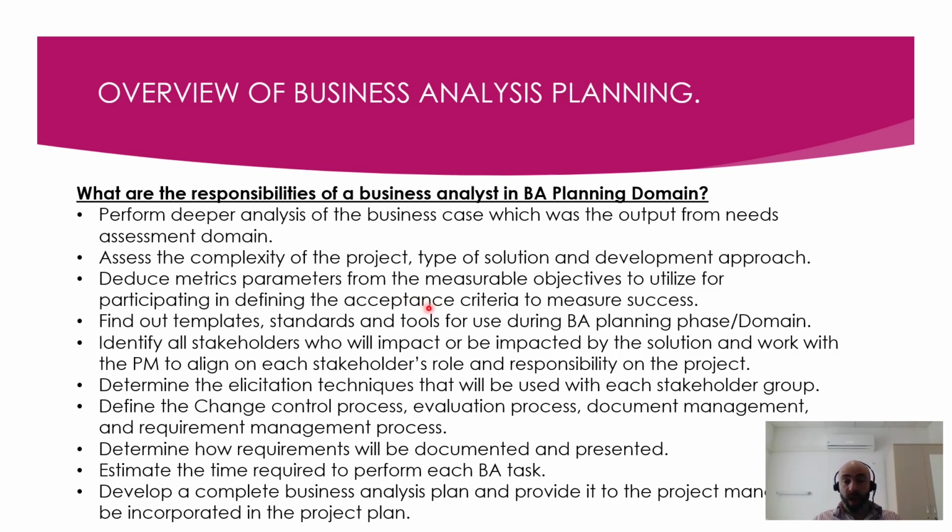So how can I determine whether my solution or my project is successful? I can only determine that if I meet the acceptance criteria, which is a measurable indicator set during the planning phase, discussed and agreed, and that is also signed off, because the acceptance criteria is part of the business analysis planning document, the business analysis plan.